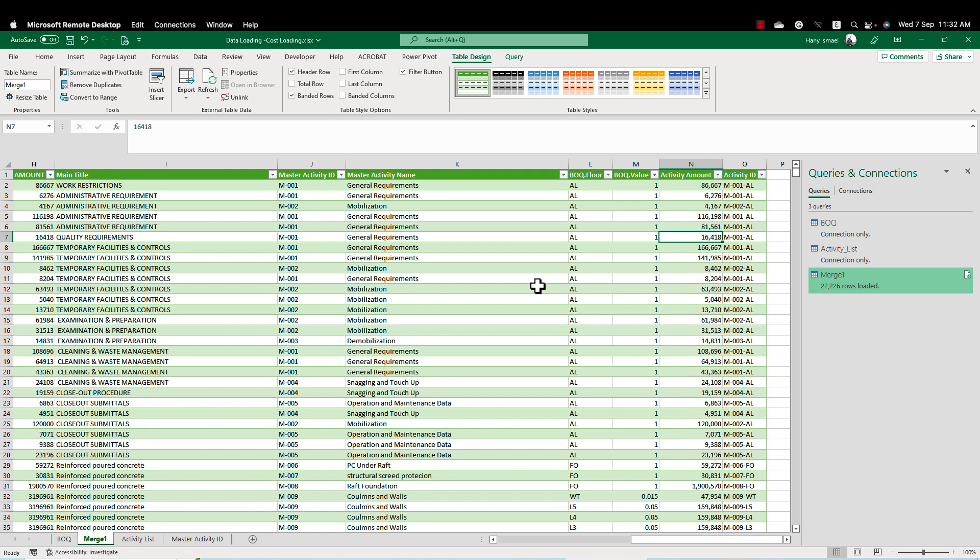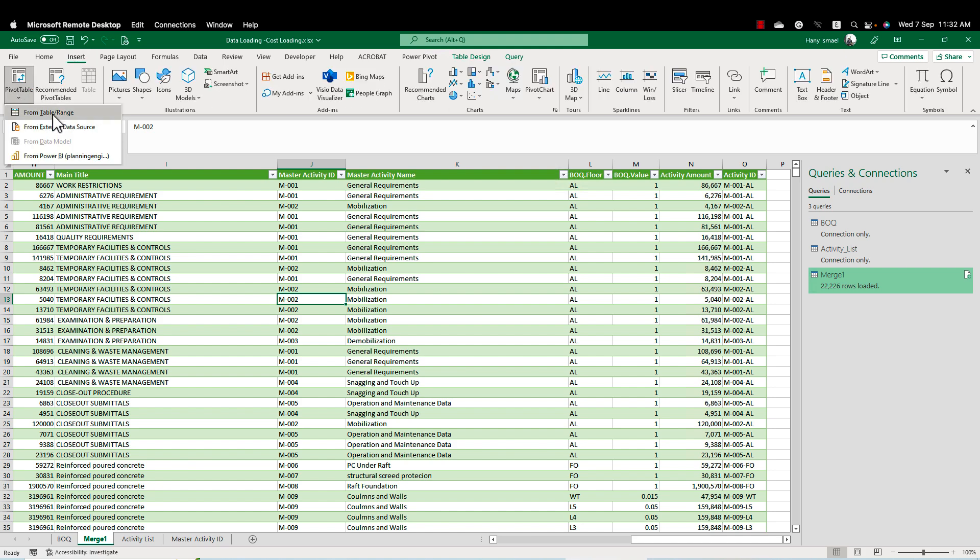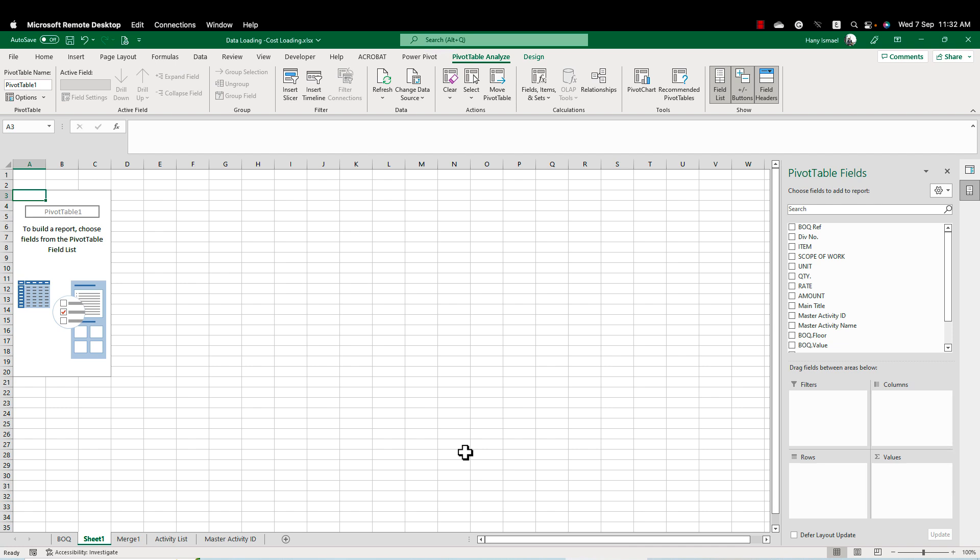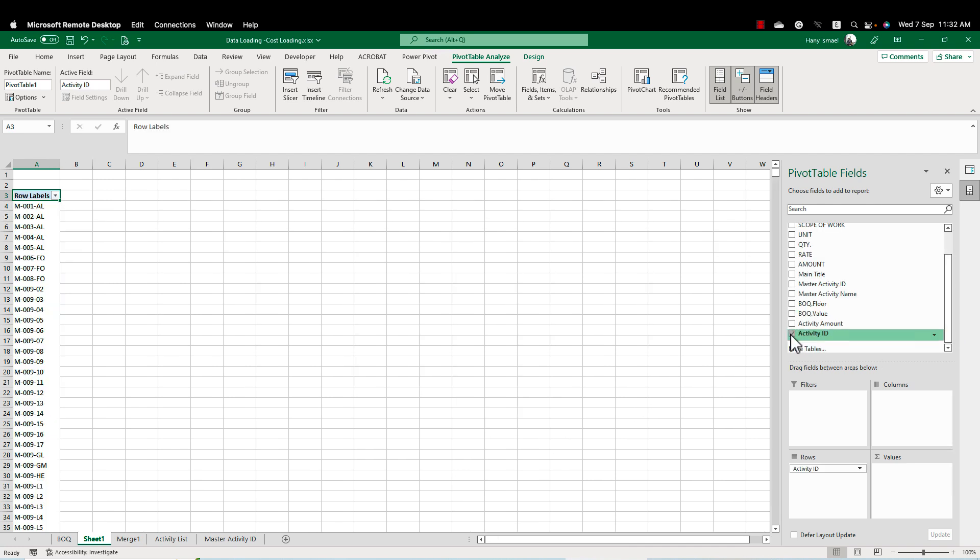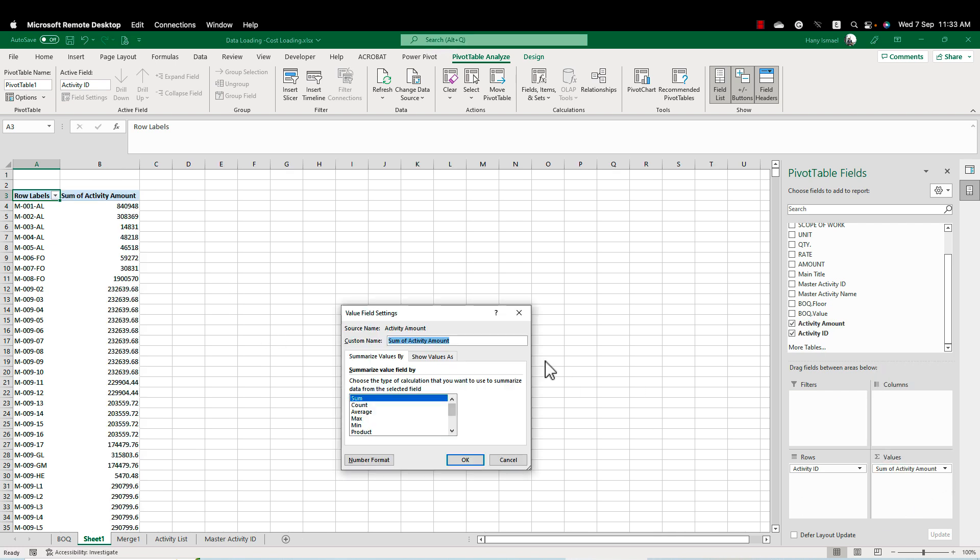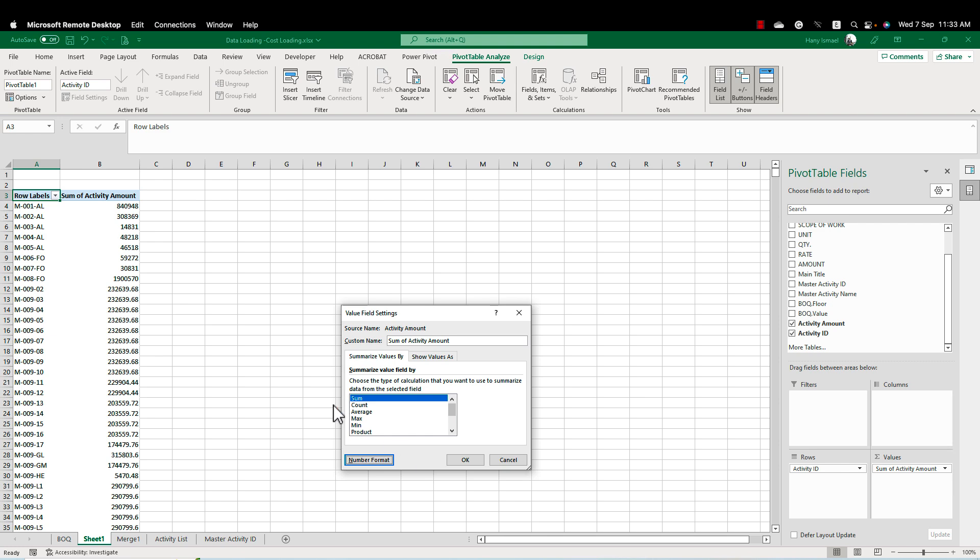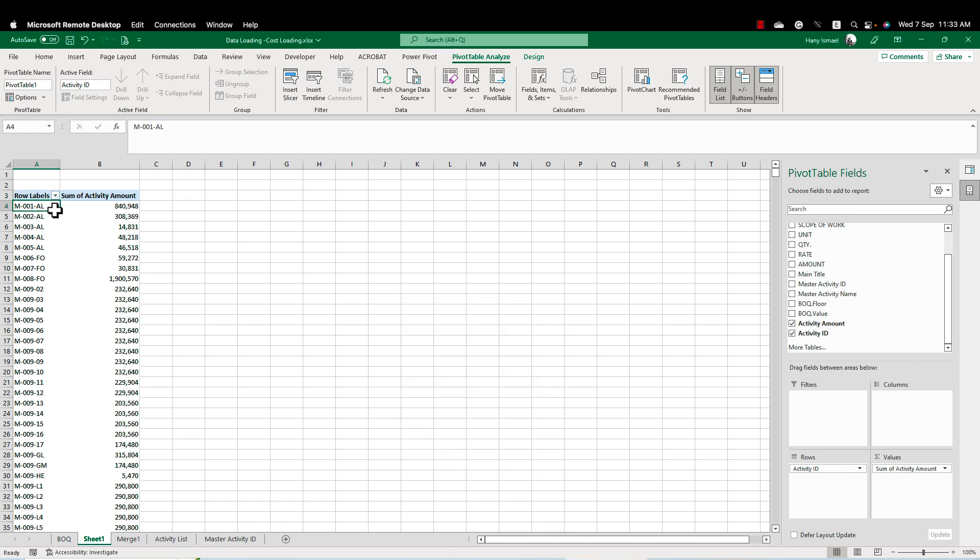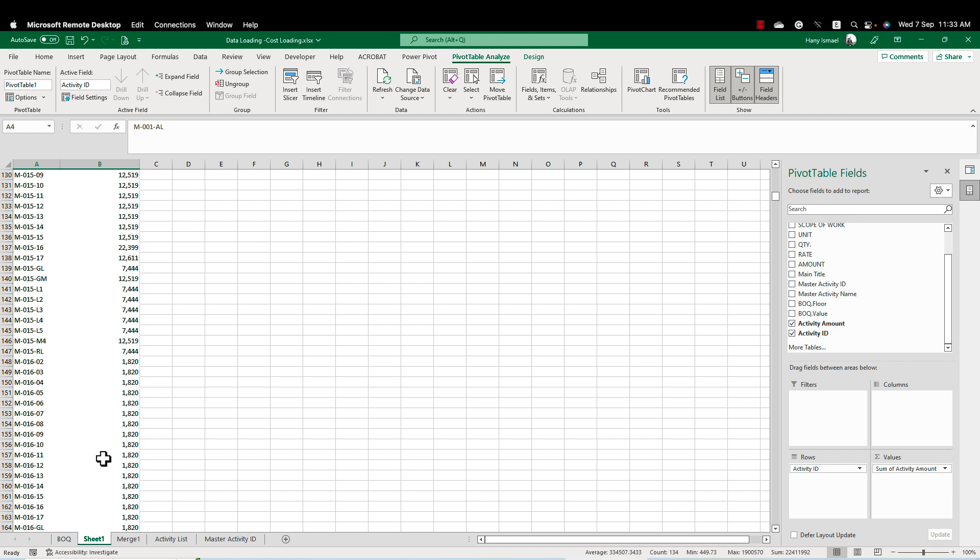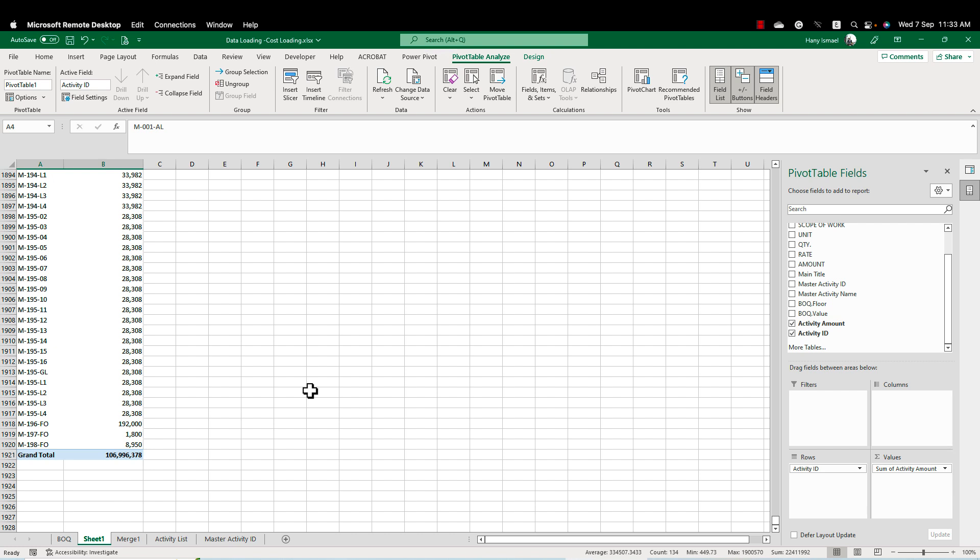So now I'm ready to create my cost loading. Because one activity here might be repeated several times and I need to gather all the activities. This is very simple. We will create now insert pivot table from table and range. Make it a new sheet. Now simply I'll put the activity ID and the activity amount and that's it. Congratulations. You now have a very detailed cost loading. And you can import this one to your Primavera. You can update the budget cost and also there are ways to create the WBS and the resource loading using the same ways.